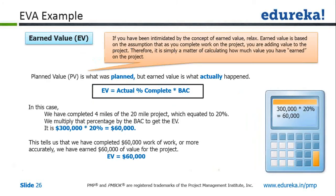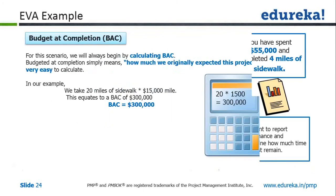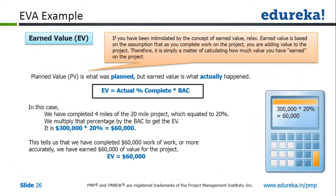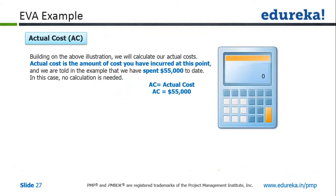Then we go to the next one — earned value. Earned value is how much work we have completed in actual. We have completed 20% of the work. So 20% of the total work — if the total work is worth $300,000 — 20% of that will be $60,000. So this gives us the value for our second element, that is earned value: the work done so far is worth $60,000. And actual cost is given to us, that is $55,000.